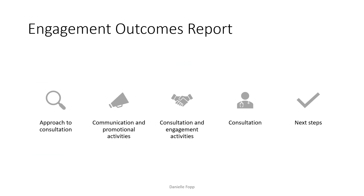There would then be an engagement outcomes report. You're not required to create one of these for this course, but you need to know what exists and what's in it. The purpose of this report is to document the results of the stakeholder and community engagement undertaken for the proposal to date, as well as to provide an outline of future engagements proposed. This report supports the environmental impact statement for the proposal.